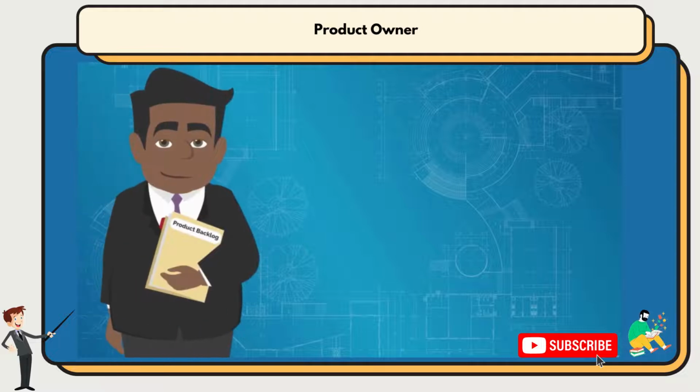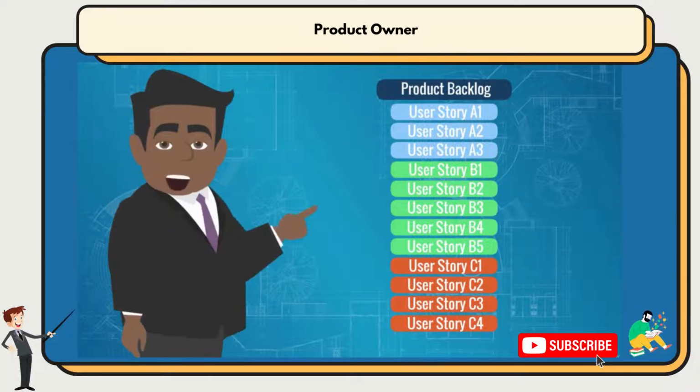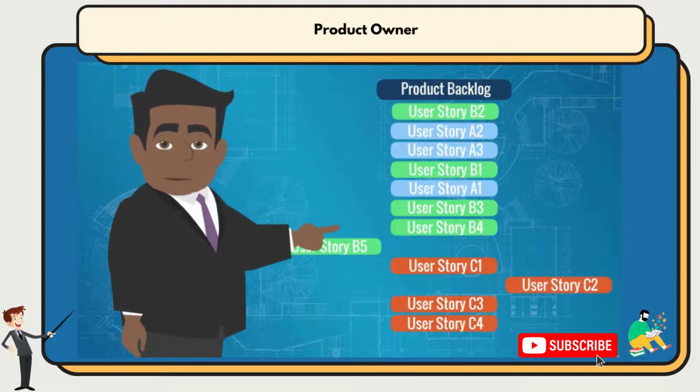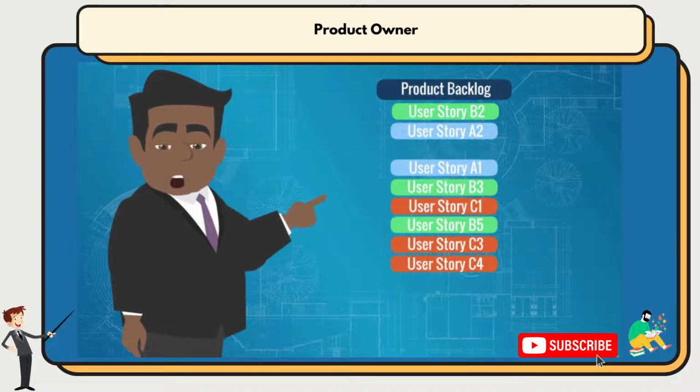First, we have the product owner. This is a critically important role for a successful Scrum project. That will be the person owning the product backlog, including all key aspects and decisions related to it. In the beginning, they are responsible for defining and validating the requirements, including user stories and epics. Furthermore, the product owner defines what the priorities are within the product backlog list. Which user stories should the team build first, which ones second, and which ones can be left for later.